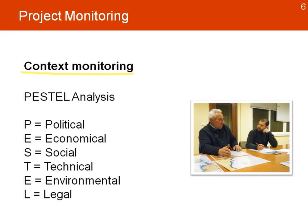One tool to help with context monitoring is the PESTEL analysis, which helps us look at the context in several areas. The political environment has an influence in terms of the people, parties, groups, or local governments supporting the project. Economic elements include price fluctuations and factors that will drive or challenge some of the project results. Social dynamics between groups and beneficiaries is also an important element to monitor.